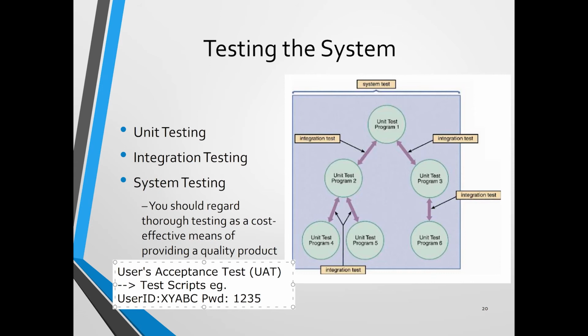The one who tests the UAT script is not the key users, because it will be the end users who really use this system. The key users are the ones who just decide on something only. They might be the head or the boss of the end users.